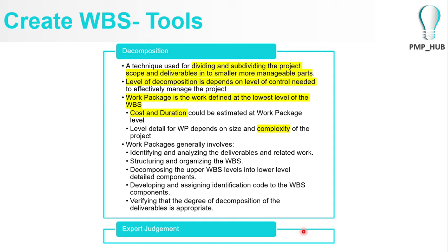Where you stop is important because that will be where you control your cost. When you're budgeting, you allocate the loan that you obtained to build your house: I allocate 200,000 out of the 5 million loan I had taken to the flooring, another 100,000 to the stairway.